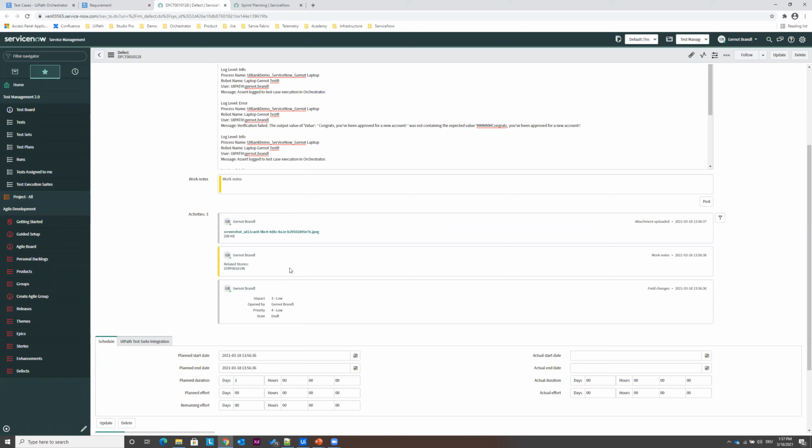So this is the first pattern. So what we did, to wrap it up, we created a user story in agile development in ServiceNow. We assigned a test to it in Test Manager. We assigned an automation to the test. We configured it to run in the test set, and we watched what the result was in the Test Manager, and we created a defect back in our defect management system, and it has the relation to our story like we did before.